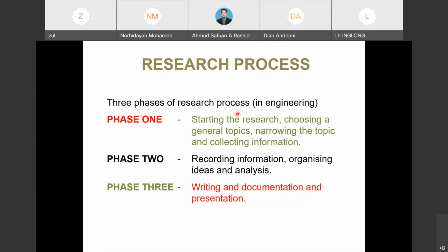To measure whether your laboratory work is sufficient or not: normally for PhD programs, we should have at least a solid 1 year of laboratory work or data collection process. For example, in my case, I have 16 main laboratory works. For each laboratory work, I need to spend at least 3 weeks, including testing, data collection and analyzing. So 3 times 16, it is almost 48 weeks.